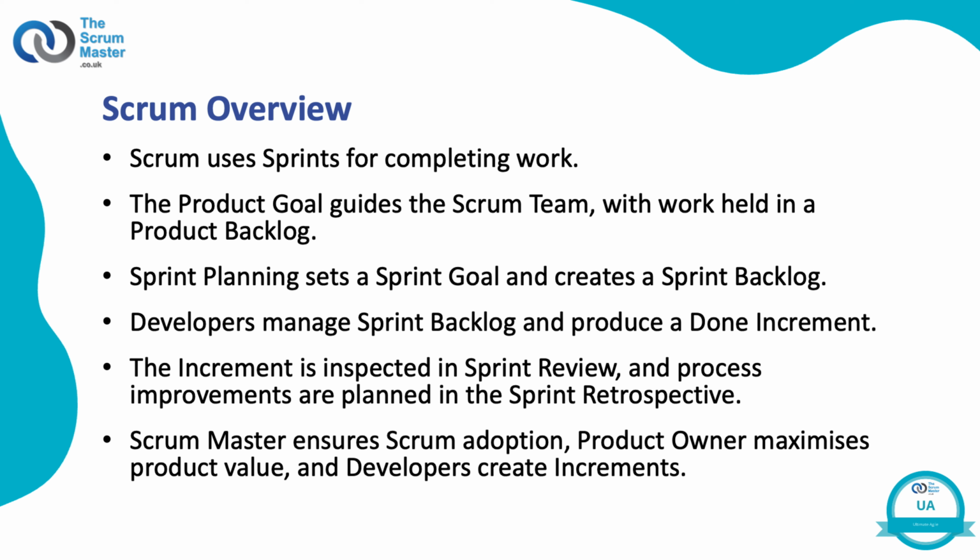During the sprint, the developers manage and work to produce a done increment that meets the sprint goal by the end of the sprint. By the end of the sprint, the increment must be usable. A definition of done helps us understand the quality required for the increment.